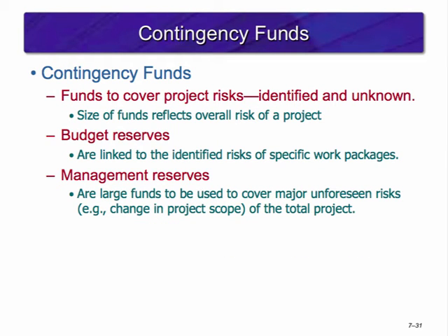Contingency funds are funds set aside to cover unidentified or unknown project risks. Project sponsors are often reluctant to set up contingency funds, as that would seem to imply that the project plan might be a poor one. The truth, however, is that risks are inherent to projects. One way to overcome this perception is to carefully document risk identification, assessment, contingency planning, and determine when and how funds will be distributed. With current high-technology projects, it is not unusual to see contingency funds running in the 20 to 60% range.